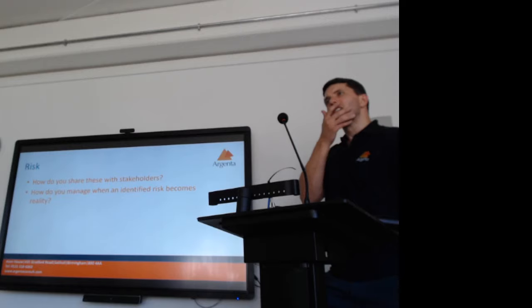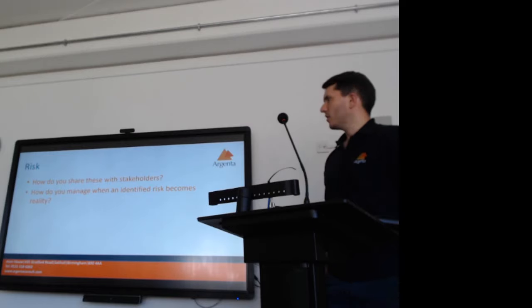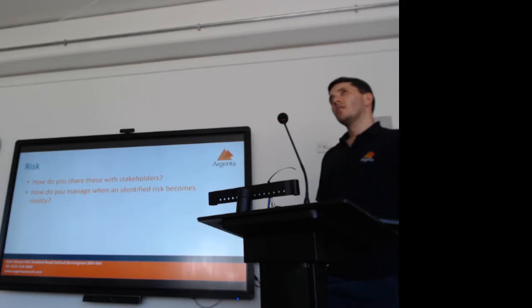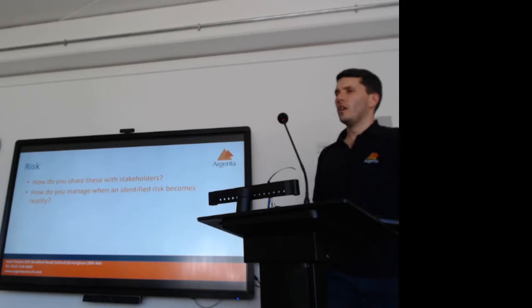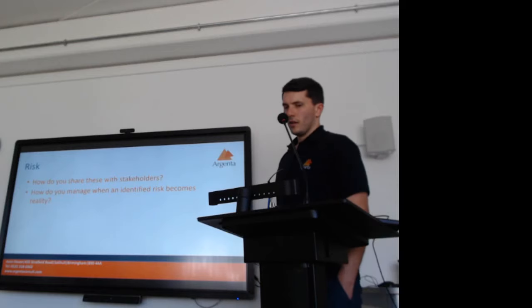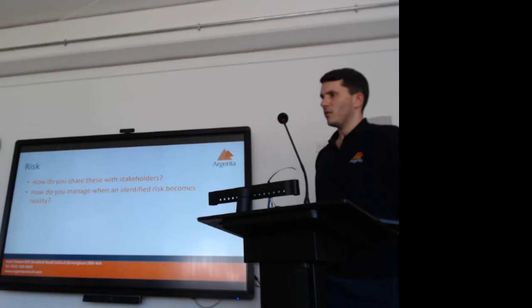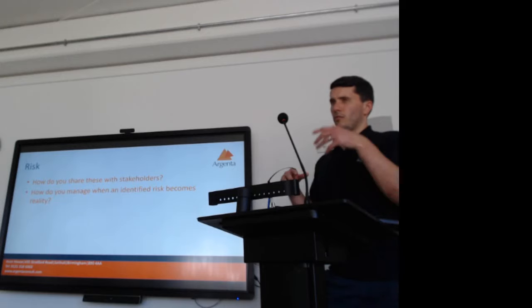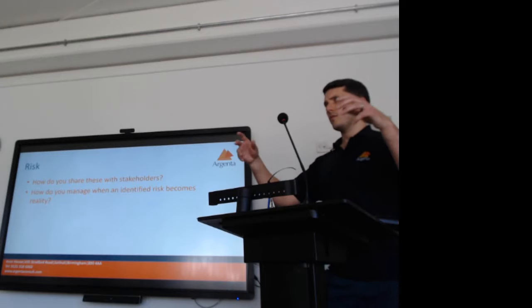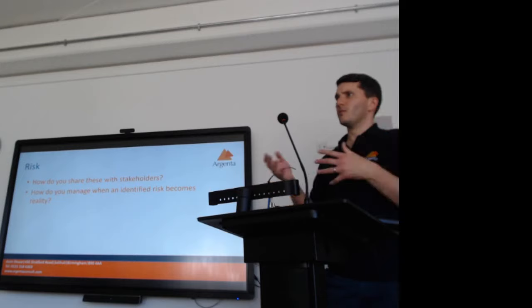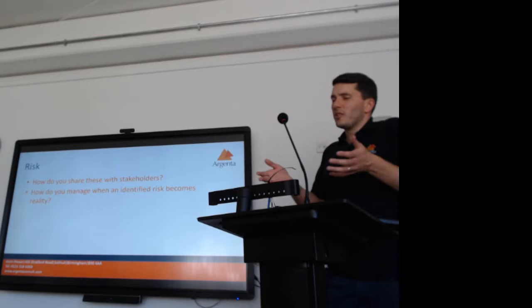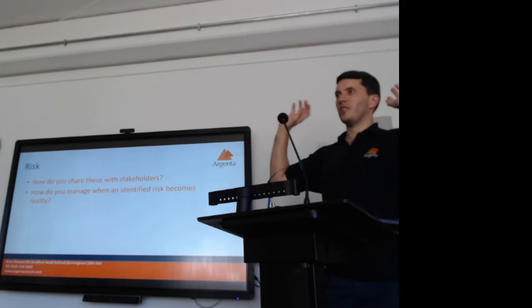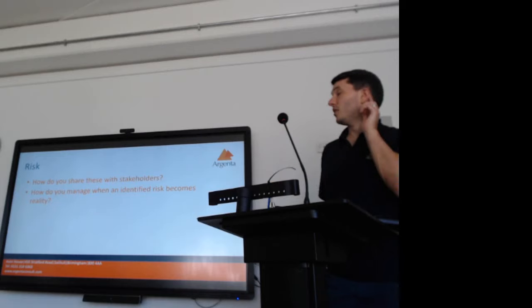I don't think we formally document risk. What we've decided to do, in proposals, is to say that we've identified that the system we're developing interacts with these other systems. So if there are problems with those other systems, then that's a risk. We just identify it relatively informally. It's not like this is score one, red zone, start flashing. It's just making them aware.